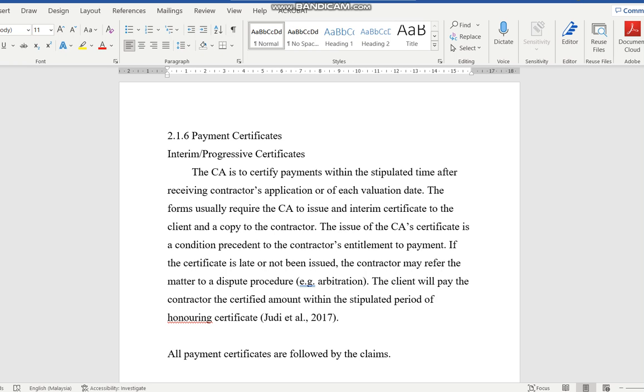Contingency is a specific amount. It's like the whole contract sum plus a contingency, 500,000 or 1 million contingency. That is because sometimes they expect some form of additional work, or they feel like the contract sum is not sure, so they put a contingency sum.